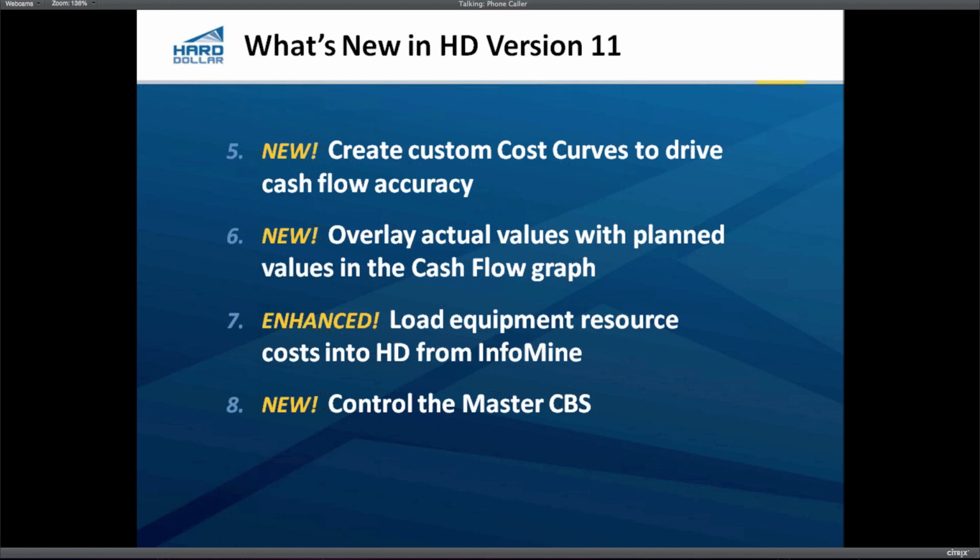Number 8, control the master CBS. So this is the ability to decide what from the master CBS comes into each new project automatically. Previously, anything you put in the master CBS, including our predefined dependent cost items, I'm sure everybody has noticed when you create a new project, all of those things come into that new project, and the ones that you don't want, then you need to go delete.